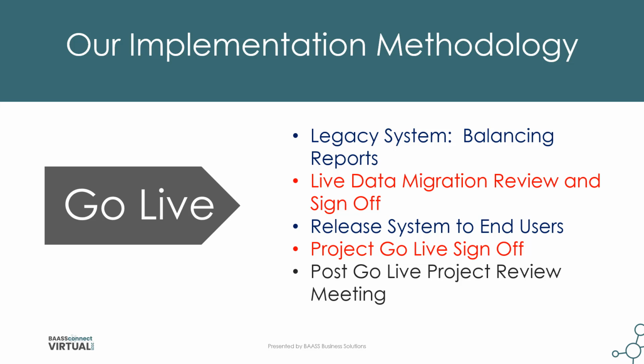Our final step is our go live. In the blue, again, this is for the client's responsibility. The legacy system will retire. It is important to print or save balancing reports that were used at go live. We will have a live migration of data that will include an update of master records and opening balances. We will release the system to the end user.